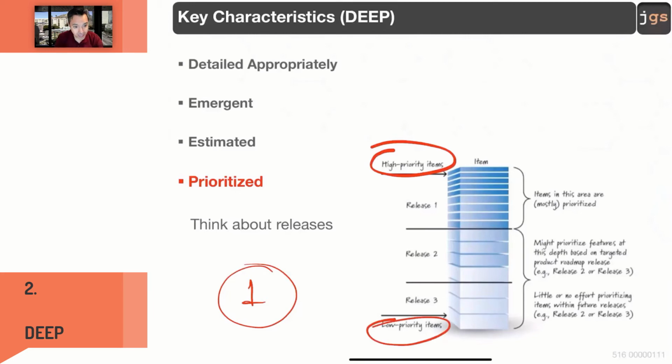Something that usually helps to assign priorities is to think about releases. Think about different versions of the software. Think about release 1, 2, 3, and so on, and try to put everything that you want in release 1 with a similar priority, 1 or 2. Everything that you want in a second release with a similar priority, 3, 4, 5. Everything that can wait for a next release, release 3, well, put priorities further down, 7, 6, 8.